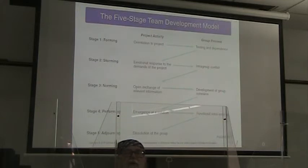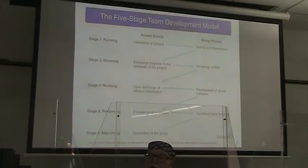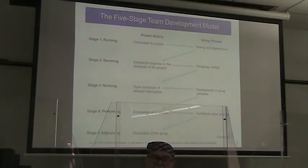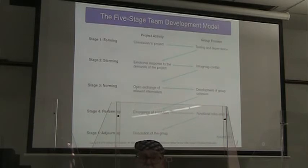We talk about the five-stage team development model. In stage one, we have forming — we're putting the team together. Our project activity is orienting everyone to the project. The group activity is testing each other and discovering our dependencies in the intergroup model.